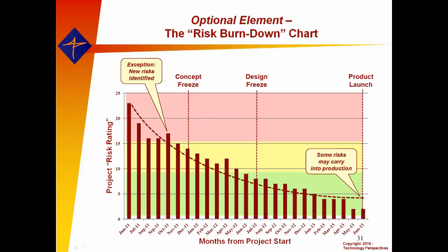What does that mean? We always do where management is focused, right? If management's focused on project boards, you're going to get a good project board. And if management's not paying any attention whatsoever, it's probably going to lose some momentum. So it isn't very hard. Just set up a system where, roughly once a month or so, you take some notes. If you could do an audit, here are the areas where you kind of get dinged. Make a little scorecard, perhaps, of they're up to date on this, they're doing that right, they're not quite doing this one. Make that a metric that you post, perhaps, so that each team gets a little incentive to try to rise to the top in the metric.